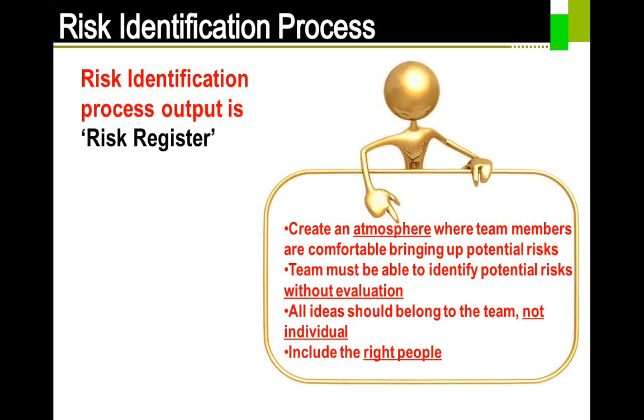At the end of risk identification, typically we would come up with something called a risk register. Again, as I said earlier, this particular figure is mainly going to offer you a tip. It is important that we create an atmosphere where all of your team members have the guts and the energy to come back and say these are the risks that are going to come into the project. Initially, as a project manager, you should be in a position to accept all the risks without evaluation, which is a main thing in brainstorming, which I'm going to cover a little later.